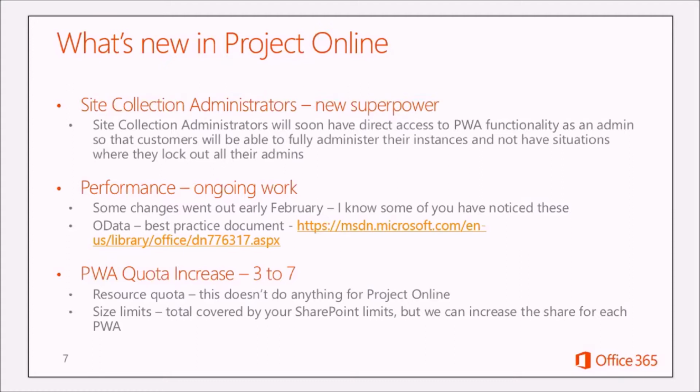The first change I'm going to mention is a new superpower that you're going to have if you're a site collection administrator. One of the challenges we've seen with Project Online, which has caused us some support issues and caused customers delays in getting access to the system, is that they might accidentally take themselves out of the administrators group in Project, and then they can't go back in to add themselves because they're not an administrator anymore. That can also happen if you're syncing to a group and you're not in the group, and nobody else who's available is in the group.